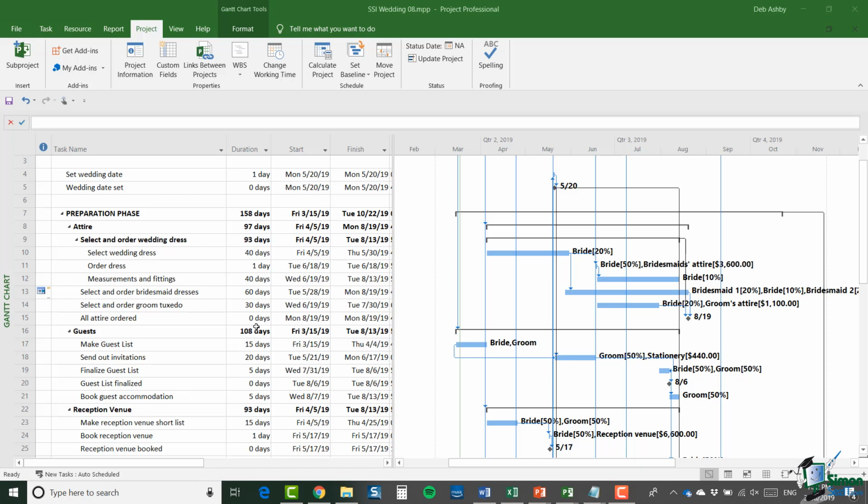Everybody's very impressed. But the reason they were spending less than anticipated was because they were so far behind schedule that they hadn't bought half of the materials required for the project yet. So what they've done is they've taken the bad news and turned it into good news. So you need to be careful to make sure that when you're comparing against a baseline or giving a report on how well the project is progressing, that you're giving a true picture of how well the project is doing.